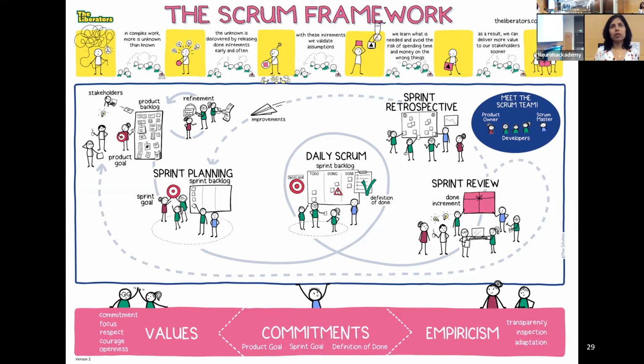The way it works in these more compressed timelines is you have multiple stand-ups a day, or oftentimes in hackathons, you're just co-working, right? You're just sitting together. So you don't need to have a scheduled one, but oftentimes it will be like, let's do a stand-up at 9 a.m. and another one at 4 p.m. to see where we're at, right? Because then if you're stuck on something and you continue to ruminate on it before you start coding again the next day,